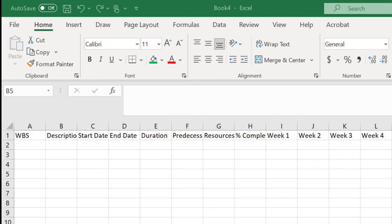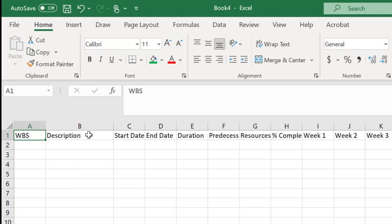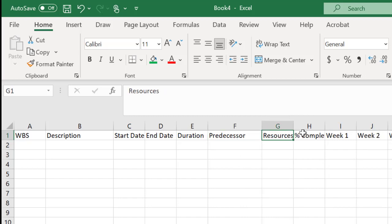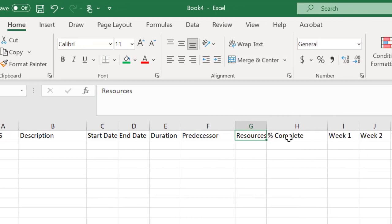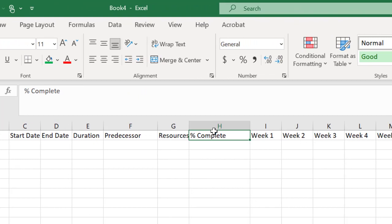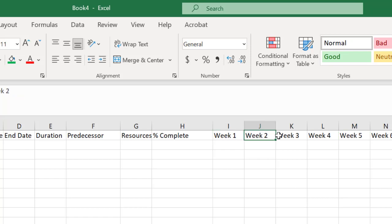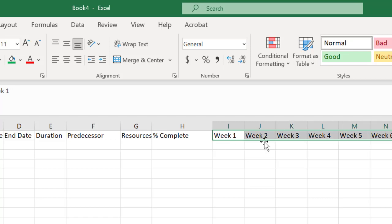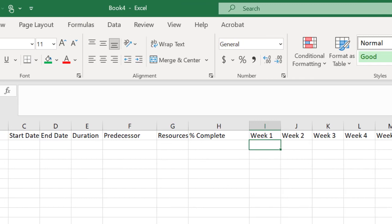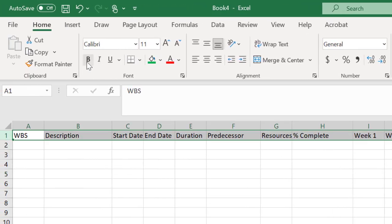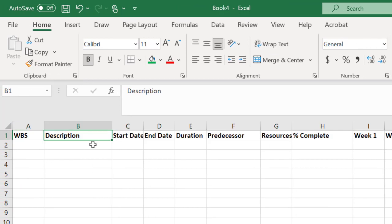Once you have Excel open and you've saved the file you want to create these columns. The first is the work breakdown structure coding. The second is a description of the task or the work package or the deliverable. You'll want the start date and end date, a duration for each deliverable work package or task, a predecessor column, resources. You might want percent complete to use this as a tracking tool later and then your timeline. I've gone for something really simple here just week one, week two, week three, but you could have these as dates or show seven days a week or months or whatever your timeline is. I've just kept this super simple for us today. It's a good idea also to bold that row just so it stands out a little bit more.